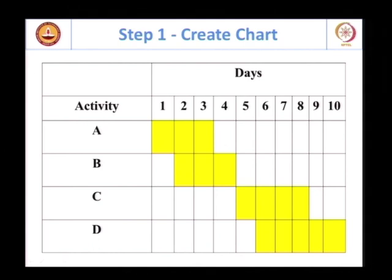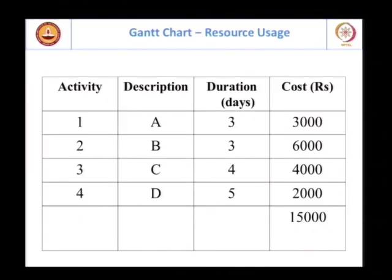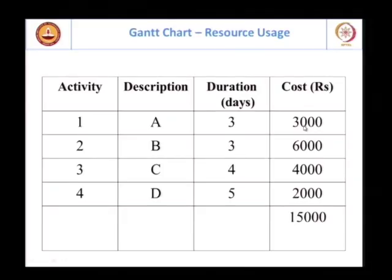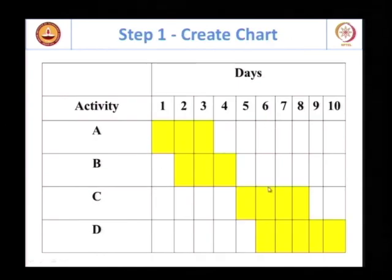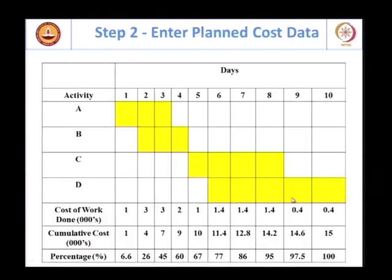A cost curve can be plotted. How would I go about plotting a cost curve? Here is some of the data. I have to assume that my cost per day will be uniform. If I assume that, it will be 3000 divided by 3, so it will be 1000 per day here, 2000 per day here, 1000 per day here, and it will be a fraction in the other one, and we will now distribute it.